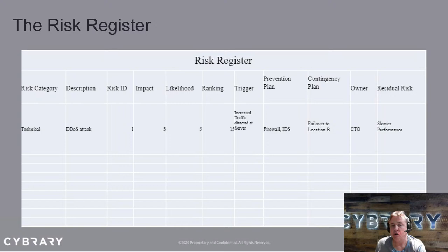Now, I want to mention this risk trigger. And I've said it's an indication the risk event is about to materialize. It's generally the point where we go from prevention to our contingency plan. So our prevention, we're going to do everything we can to stop it. Oops, there's some indication it's happening anyway. We move to contingency. So our prevention plan is we have a firewall,